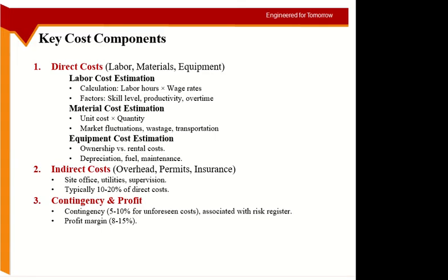So labor, when they are working in normal hours, their charge is less. When you keep them working for overtime, charges are higher. Per hour charge for normal time would be, if it is 10 BD, then overtime could be 12 BD per hour. Okay. Skill level, obviously, foreman, 8 hours working of foreman and 8 hours working for a person who is just lifting or transferring the material. Okay, the foreman will charge you more, obviously.